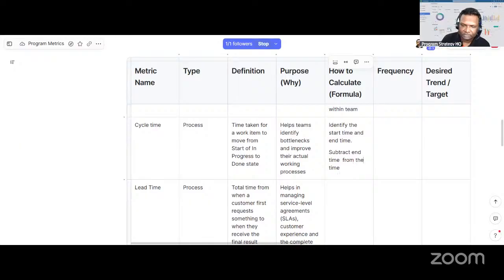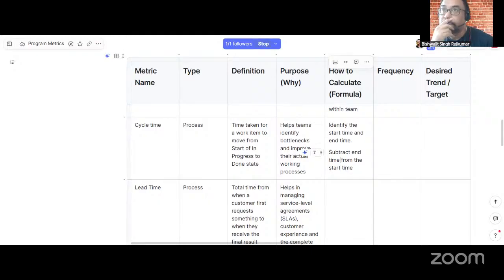How practically can we use it? Actually, my question is, when you're starting a project and the first sprint is done, our cycle time is 3 days. Over a period of time, I will try to improve on that metric. If I can bring it down to 1.5 or 2 days, I can say our process is improved by 50%.